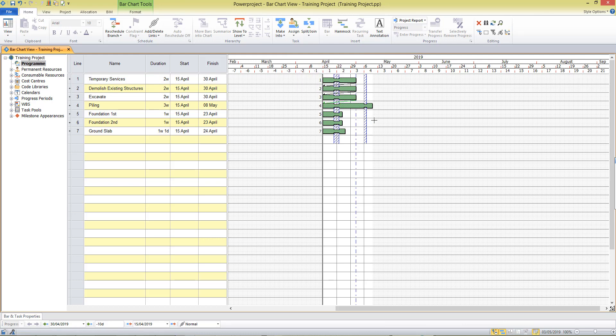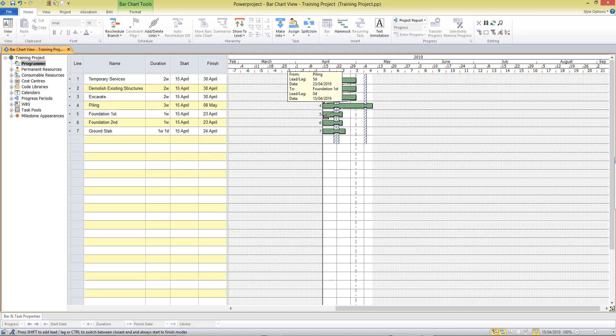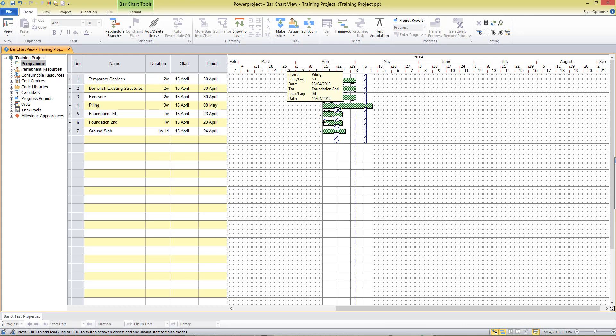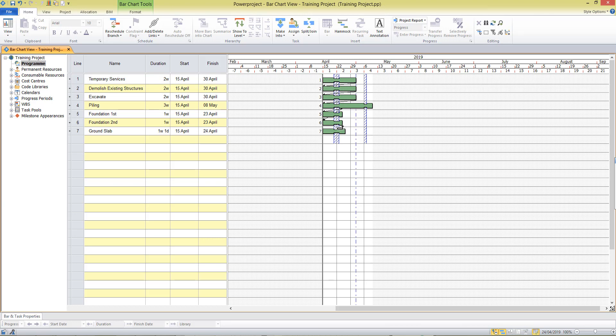We can also draw mid links so I may decide that one week into the piling activity, that's five days, I'll drag and draw to start the first foundation task. We're placing our cursor along the bottom of a task without clicking and at the required duration we can click and drag to draw the link to the next activity. Then I'll put a link in there from piling to our ground slab.